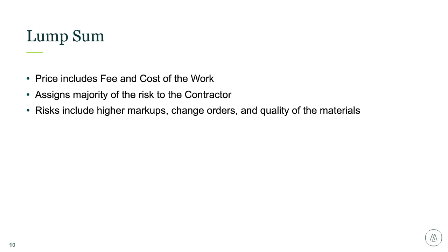These contract types are often utilized for cookie cutter jobs. For example, we had a Fortune 500 company who built many of the same buildings within a similar geographical location. They did a GMP contract first and then utilized lump sum contracts that were awarded via competitive bid process as they knew the approximate cost for each building.